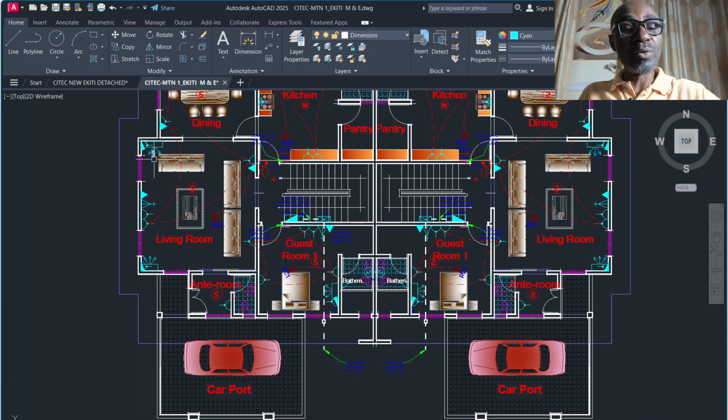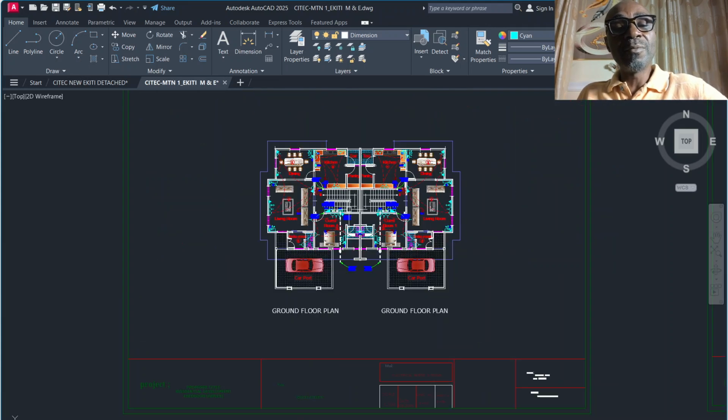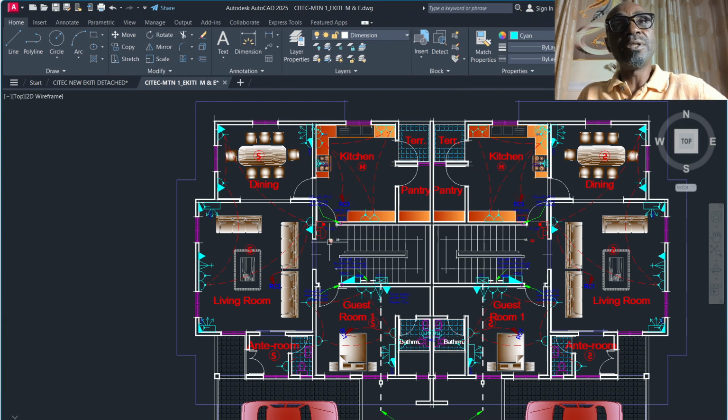We have two ACs. Normally, if it is a power point, you loop from this to this, then you take from here. But there are two ACs, so you take this one directly to the DB, and you take this one directly to the DB. You take all directly to the DB. You add them together, average them. It tells you what you are going to apply.